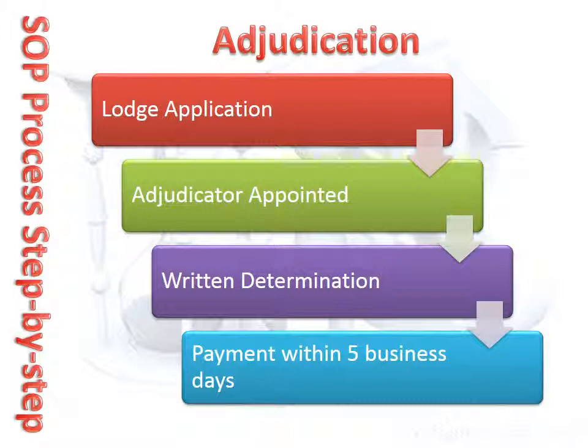Generally, the adjudicator will award the costs of the adjudication against the losing side. The determination will be released by the nominating authority once payment has been made with the adjudication fees. Often this means the claimant will pay the fee and then recover them from the client.